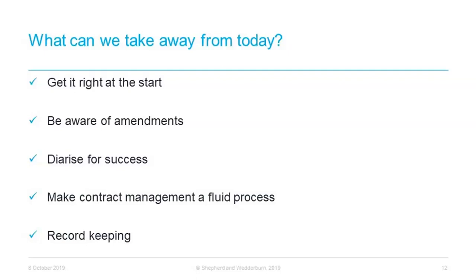Be alert to the issue of business days in GCT contracts, as in some months the IVD will not be a business day, and this has a knock-on effect for all the dates in the payment cycle, including payment notices and PLS notices. Lastly, appropriate records should be maintained throughout the life of the project, creating a contemporaneous history of events.